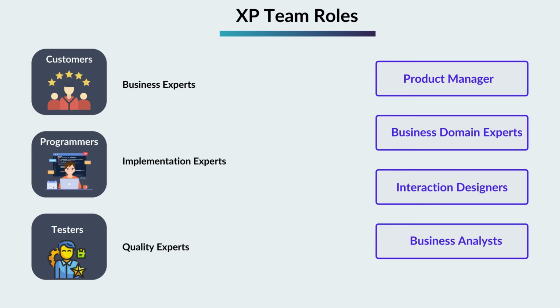Testers. In XP, the testing role is not specialized. Testers are considered part of the development team, and they contribute to various testing activities. While there is no specific ratio, it's recommended to have 1 tester for every 6 developers. Testers collaborate with customers on exploratory and user acceptance testing.